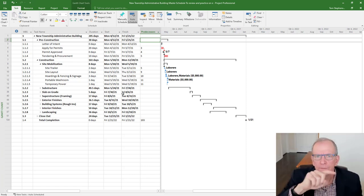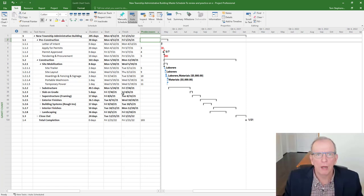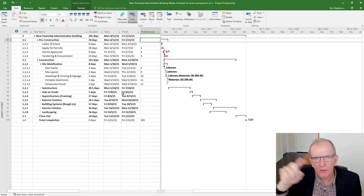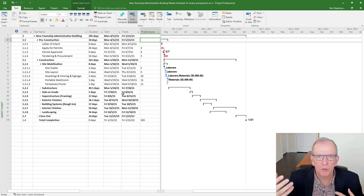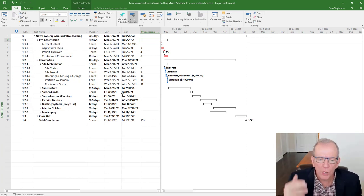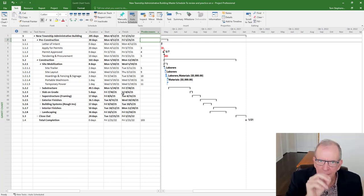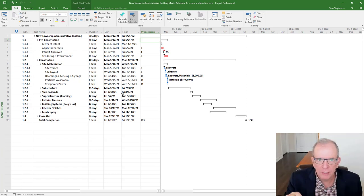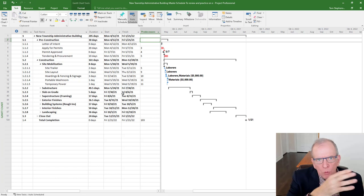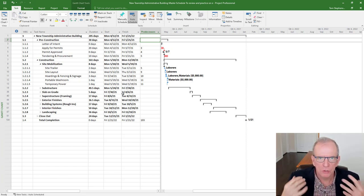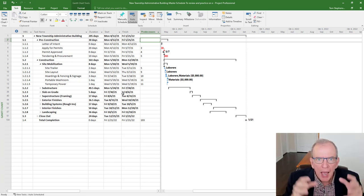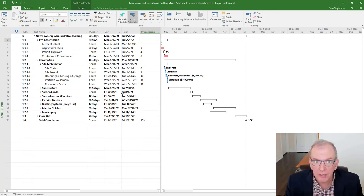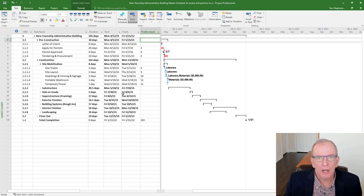I'm not linking to, I finished this activity. I start this whole area of work. It may be true, but you don't want to start linking those tasks because then you end up with redundancy. You're over linking different tasks. You should link them the way that you want to run your project. And that is thinking from one activity to the next activity. You want to have a continuous flow of work in your project.